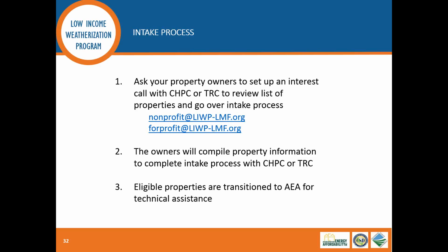And then once CHPC or TRC complete that initial screening process, then they'll get transitioned over to AEA, and we'll do some desktop analysis to identify generally what the opportunities could be, what the incentives could be, what the percent savings could be. We'll follow up with the owner on those opportunities, and if everything looks good, then we'll officially escalate the project, go out and do the full site visit, and put together a potential scope of work with the building owner.